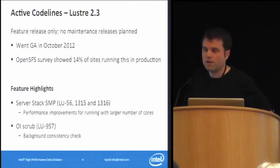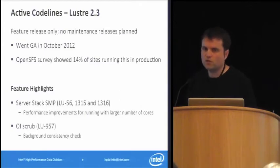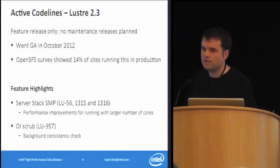So I did want to extend a thank you to the folk at NASA around this. As part of our ongoing work, we had been landing fixes for the newer kernel support for clients, and we knew that we had the code in for SLES 11 SP2 clients just before we tagged RC1, but it was too late in the day for us to change the test matrix for that release without jeopardizing the scope. So we were sticking with our plan of record to officially support that for 2.4, but NASA had an interest in using that, and so volunteered to be guinea pigs and test that out.